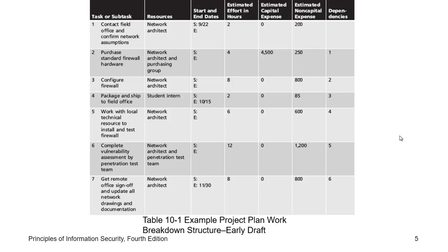And then we have the dependencies, or in some other cases we call them predecessors. As you can see here, you cannot accomplish task 4 without finishing task 3. So you can see here that I need 3 to be done to start executing task 4, and so on.